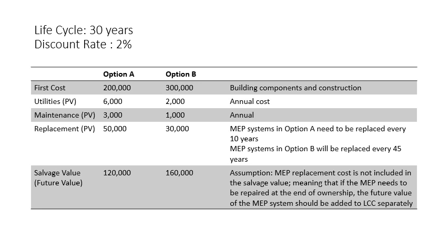Salvage value is given in future value, and it means that you have to discount it back to present value. And this salvage value does not include the MEP replacement cost. I hope this example and this exercise is clear to you. I will review the answers next session when I join the class online.